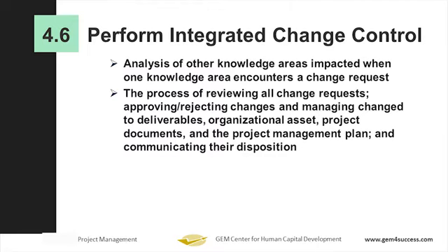So what this means is change cannot just happen arbitrarily. As long as something has been signed off as a project baseline, it cannot change without the approval of the organs. So the process of reviewing all change requests. If something needs to be changed, it's not all the time that change requests have to come from the top. Change requests can come from any stakeholder. You understand? There is no automatic accept, automatic reject.